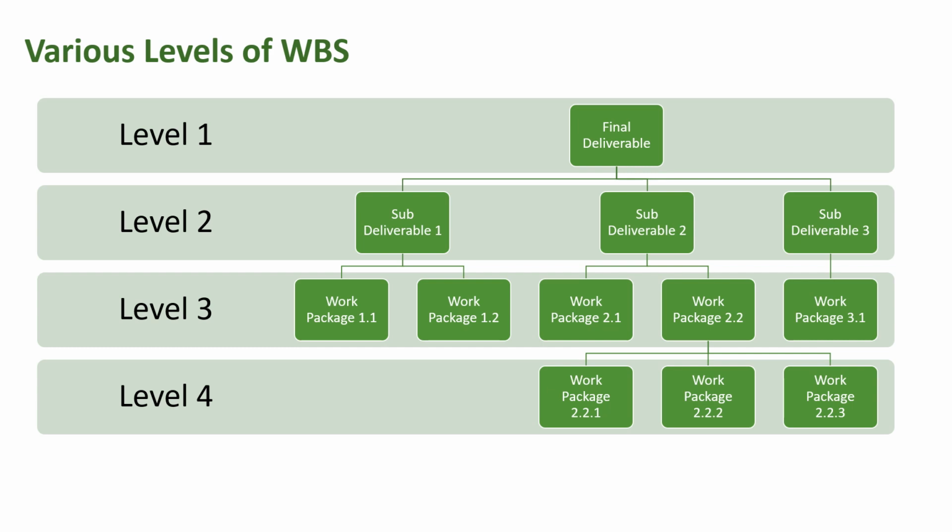Firstly, the project or final deliverable is identified. Parts which constitute a complete deliverable are divided as the second level, followed by divisions in detail as required per project characteristics. The stages can be further divided to make them assignable to a single individual or unit. They can be called work packages. Each work package should be unique and distinct. It is analyzed whether a work package can be further divided into smaller parts. It is likely that work that gets missed in the work breakdown structure is missed in real time and may cause hindrances in the project. Hence, it should be detailed enough to include all the activities required for the complete project.